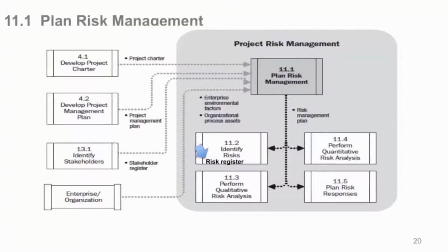game, and you would have been tracking your risk register, you'd be following it, saying, well, things are happening and this risk just might occur, and then you have a plan to avoid it, or if you don't have a plan, you may have to issue some change requests for corrective or preventative action. So risk is really important on a project. Don't overlook it. So stakeholder comes in, certain environmental and organizational process assets come in, like risk templates and guidance